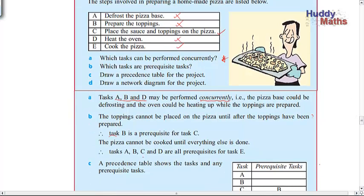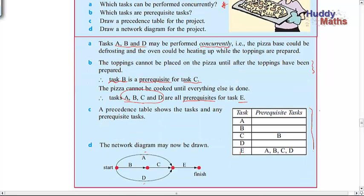The toppings can't be placed on the pizza until the toppings have been prepared. So task B, preparing the toppings, must be done before task C. That's putting them on the pizza. And at the end, A, B, C, and D are all needed before E. Because you can't cook it until everything else is done. So do you get the idea? So this is a good little thing to do. You've got your tasks as before. And then opposite each of them, you put what's needed to be done before it. Nothing for here, here and here. They can all be done together with nothing coming before. But C needs B to be done before. And E needs everything to be done.